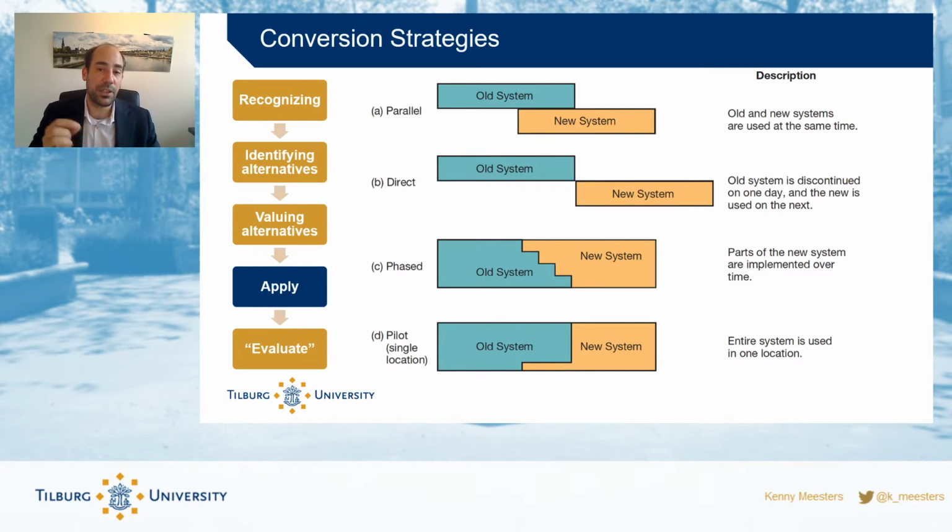The advantage here is that you could use those people who've been a part of the pilot as ambassadors, or people who could help users that are now transitioning to the new system. The downside here is that you will still have this big cut where everybody's going across, and it will still be a productivity dip, and you have to be ready to support the users there.